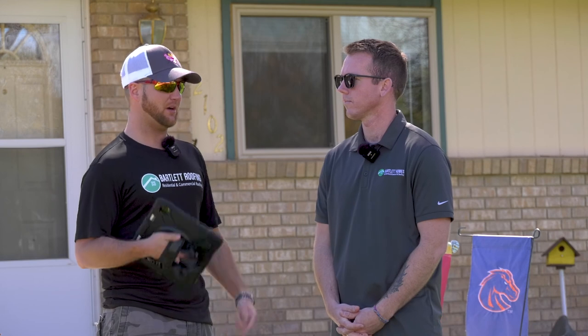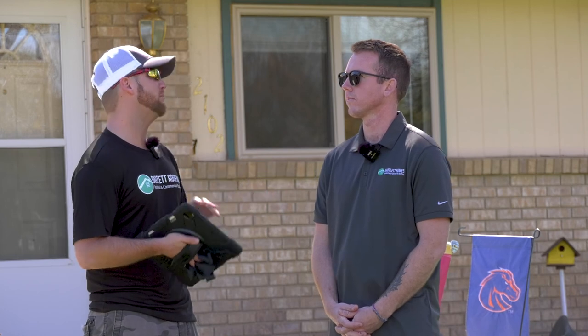So you've started your midpoint inspection, you're gonna start your walk around. Part of those line items is tarps laid out, dumpster, how close it is to the garage, ladder safety and gutter protection. So you're gonna walk around the house, you're gonna grab photos of those tarps, showing we protect the homeowner's property, not only just getting your own eyes on it, but documenting everything you're seeing and inputting it into that midpoint inspection.